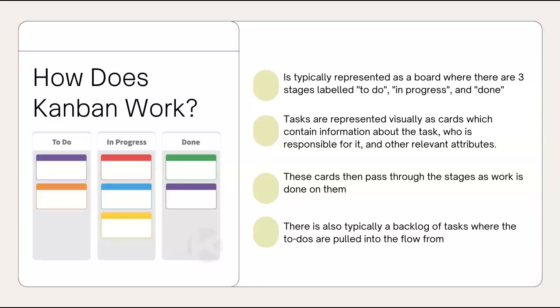So using Kanban, like I said, teams can optimize their workflow. They can see what needs to be done at each step. Kanban boards can be physical or digital and are a great way to visualize work progress and create a flow between steps. Generally, Kanban boards are separated into 3 stages: to do, in progress, and done. Software teams, however, often have a 4-step of review that comes in after the in-progress stage and before the done stage.